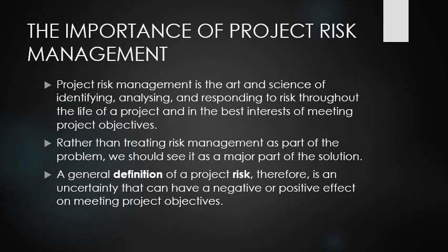The investment that an organization is willing to make in risk management activities depends on the nature of the project, the experience of the project team, and the constraints imposed on both. In any case, the cost of risk management should not exceed the potential benefit.